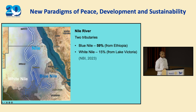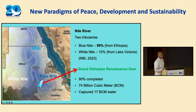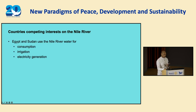This river became a source of conflict for the three countries when Ethiopia announced the construction of the Grand Ethiopian Renaissance Dam in 2011. This dam is still under construction and has reached 90% completion. When completed, it will have a total water holding capacity of 74 billion cubic meters. As of now, it has captured 17 billion cubic meters through three rounds of water filling.